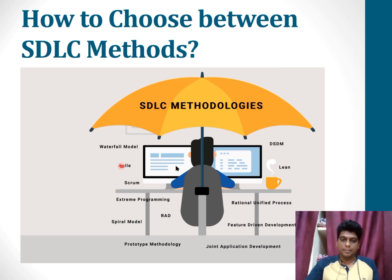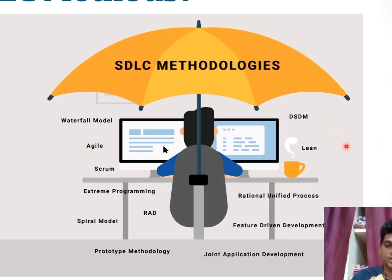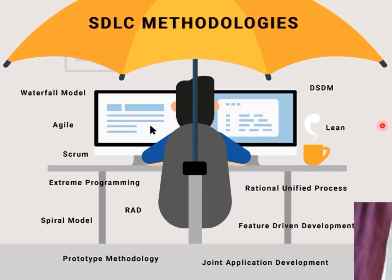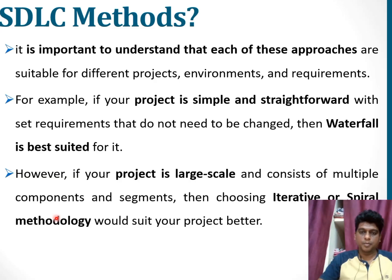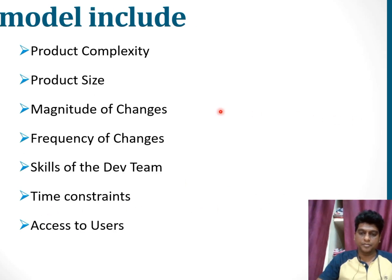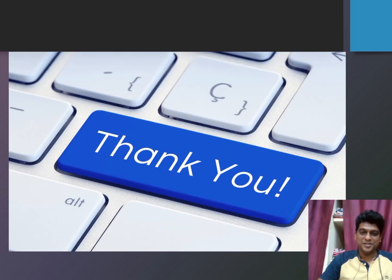How to choose the right software development life cycle methodology: among the many methods, we need to select the appropriate one for a particular software development project. If the project is very simple and straightforward, the waterfall method is the best choice. If the project is large, either the iterative model or spiral methodology is preferred. As a developer, it is important to understand all the methods discussed, and based on all the criteria, decide which model is best.